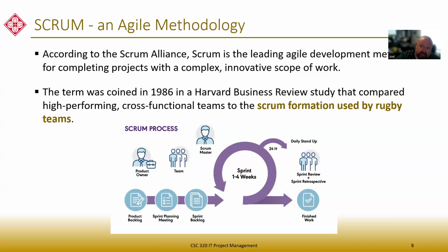And then the next day when they get back together again, they report on here's what we created. We're able to do this. We've got partially through it. We still need more time on it. Whatever the thing is, they give a short description and then they get their new orders for the day and then they blast off. The idea here is that at the end of the sprint, you have a finished product. So we have selected a sprint backlog that when complete will have some deliverable part of my product, and now that goes out the door and gets added to the completed pieces over there.